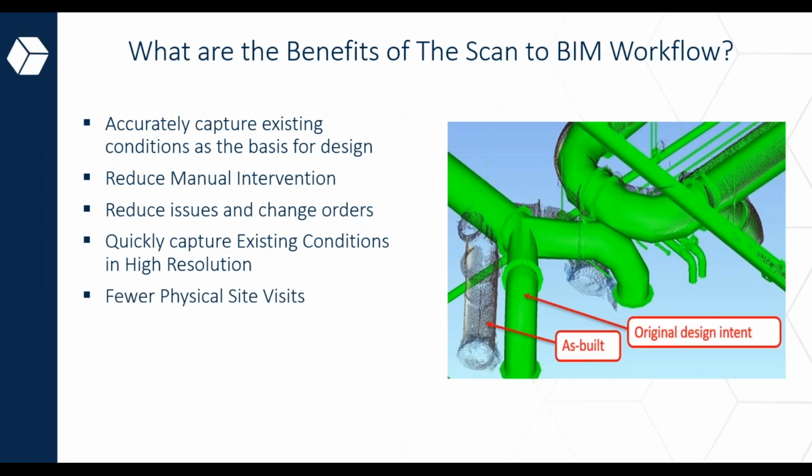As I mentioned with the traditional workflow, a lot of site visits are required. But with the scan to BIM workflow, the need for physical site visits is significantly reduced. So your initial scanning process basically captures the necessary data, eliminating the need for frequent site visits if data is missed for additional measurements. This not only saves you time, but basically reduces the overall cost of the project because you've got to take into account travel and so forth. The digital model and information can be accessed remotely as well, so that facilitates remote collaboration.